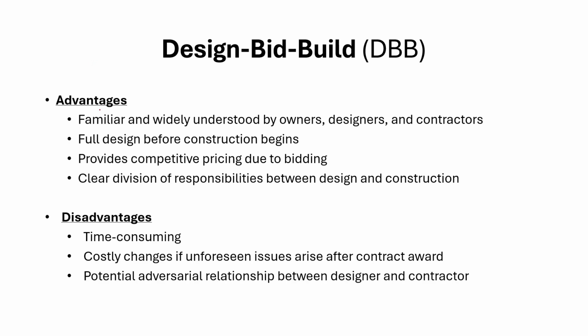The main disadvantage of this type of method would be that it is time consuming. This sequential process of design, bid, and build can extend the project timeline. Any changes to the design during the construction phase, that is the last phase of this method, may lead to costly change orders, and disputes can arise between the designer and contractor, particularly if the plans are unclear or errors are discovered.